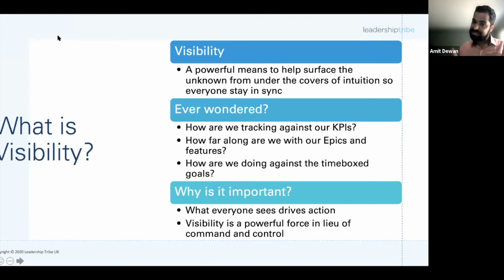What this means is something else that we originally planned for, because we already planned the entire quarter, something equivalent to this feature will have to come out. And then have those conversations. Without visibility, it's really hard to have those conversations and get greater predictability, greater visibility, greater alignment. There's a lot that goes into getting those conversations started.